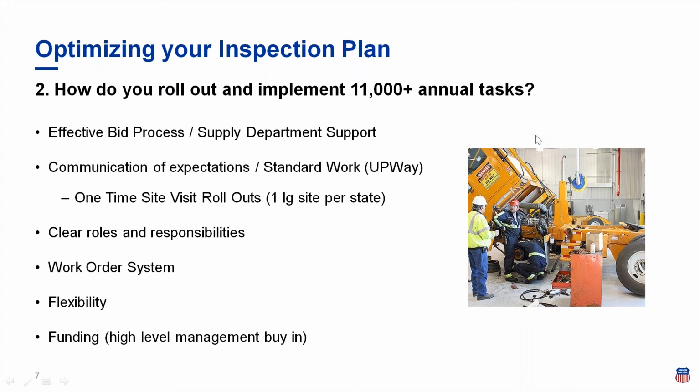Flexibility. So flexibility is, in my mind, just listening and acting on those efficiencies. Everything can get better. Nothing's perfect right out of the gate. So for an example, there was a few of our contractors that came back and said we could really make this more seamless and painless process if we use tablets and we go digital forms.